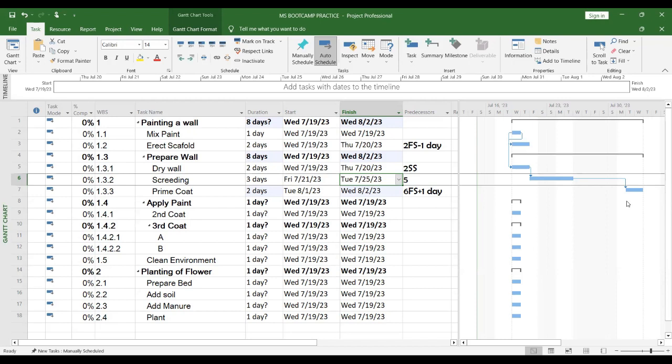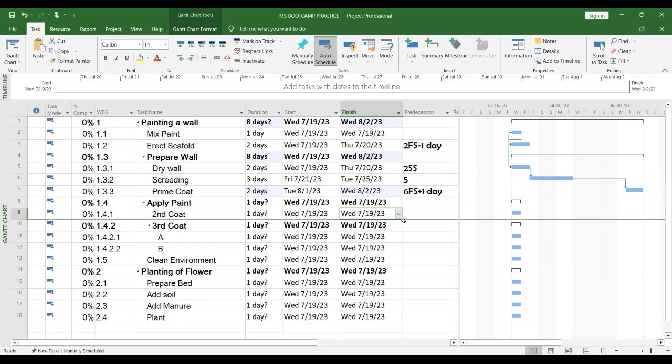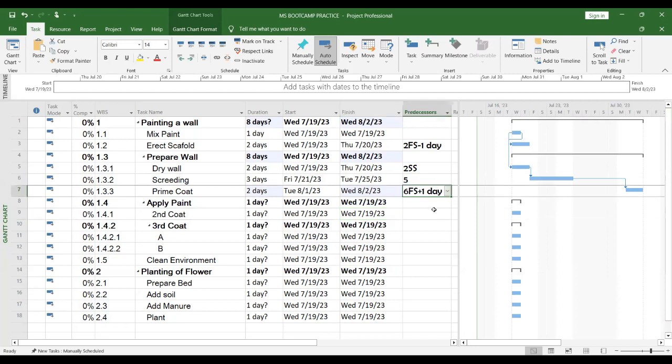You know why I call Sukomi's name? Because in the last class, that's the question. Sukomi asked whether there's a setting we will do at the back end. And I said yes. While I was doing the lecture, I chose 26, 27, 28, if you remember. And now I have applied a 1-day lag, because I forgot that there was a public holiday.